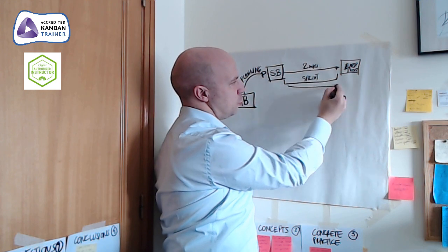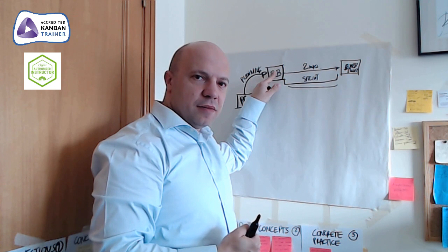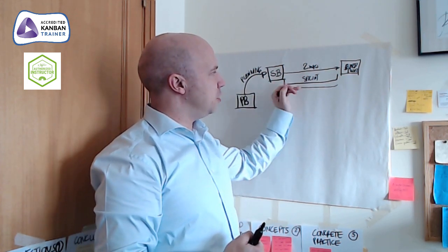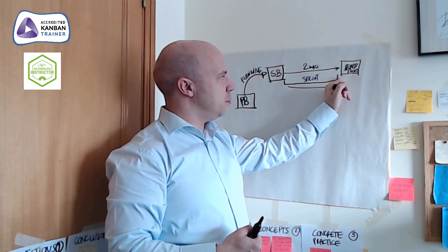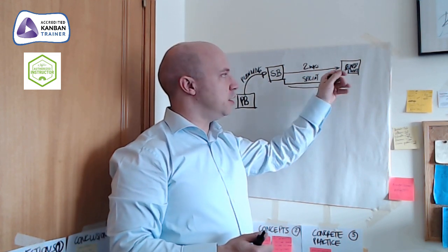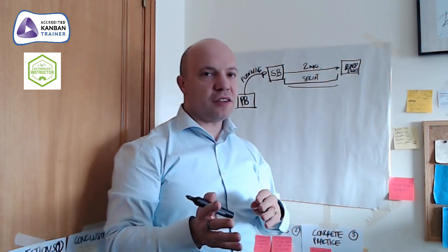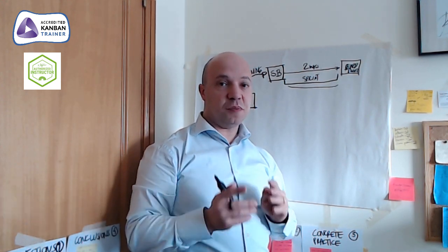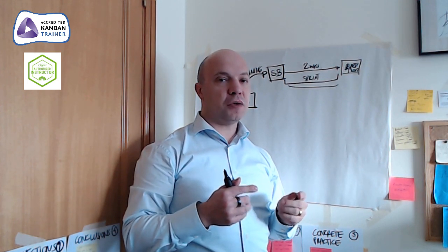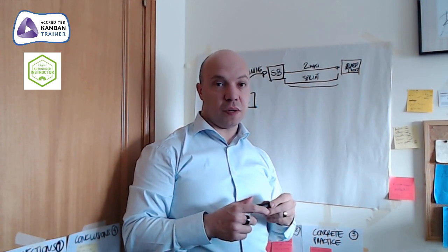And the thing is, during this sprint, we have the sprint content, and the development team should be left alone during this period by business so they can do their best to provide the increment of product at the end of the sprint. So there is also a trade-off here for business: we will do our best to deliver what we have proposed ourselves to deliver during this sprint, but don't interrupt us.